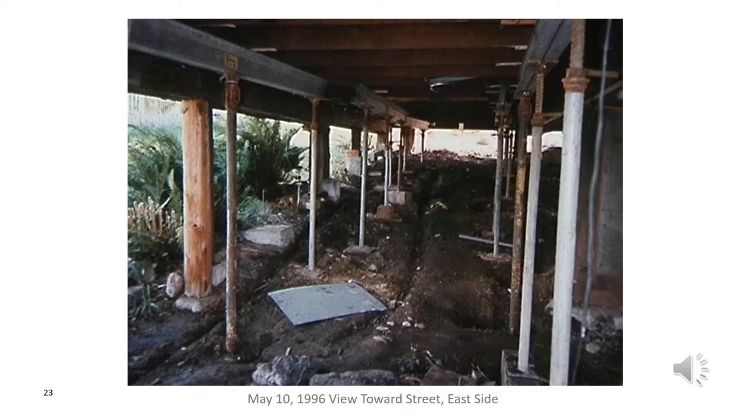When I took this picture, I was bothered by the lack of cross bracing, that it was all just vertical support, but it didn't trigger enough in me to take any action about it. The architect for our project, Gene Gerlich, had visited the site about the same time, and he had the same concerns, but neither one of us took action on those concerns, unfortunately.